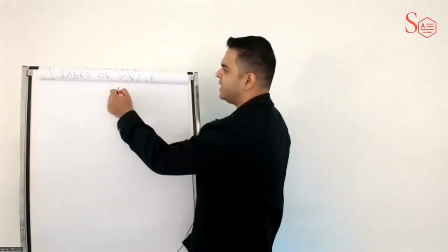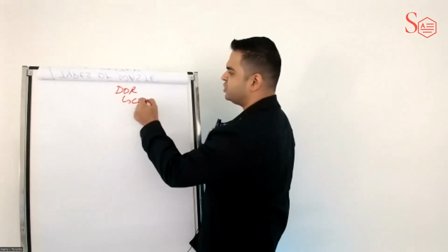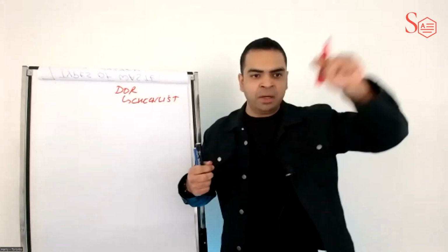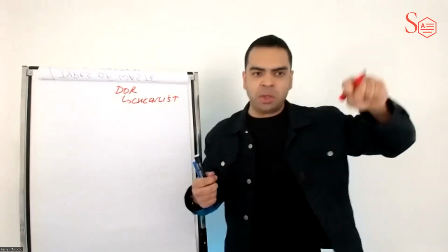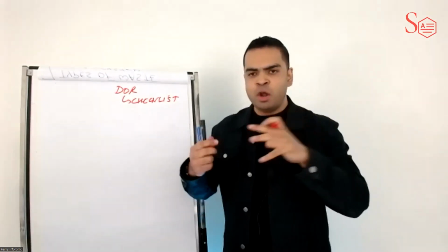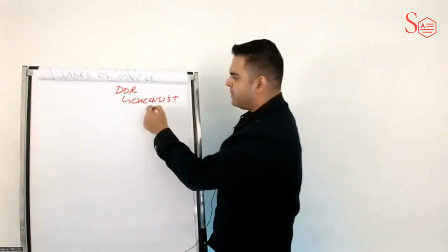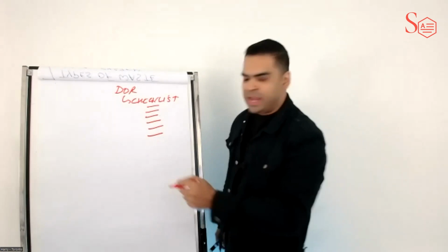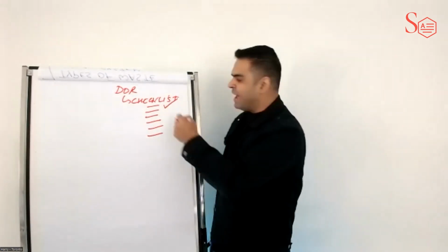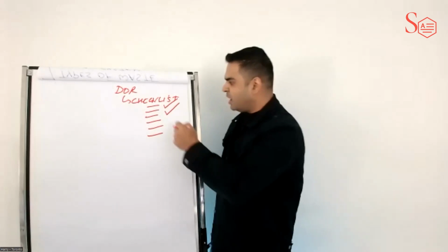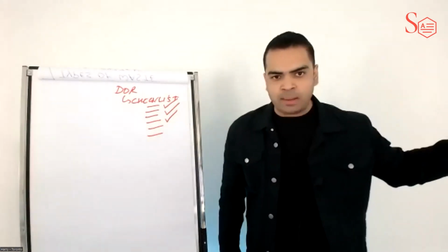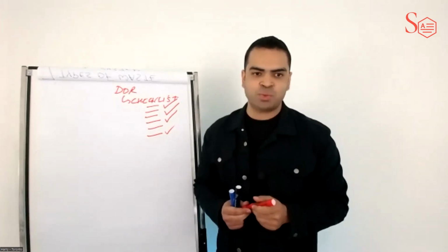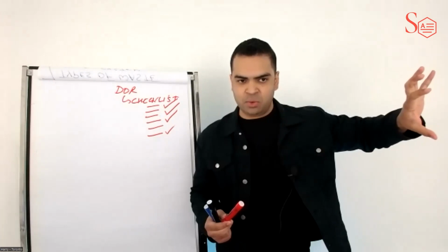Sorry. Spot on, right? So definition of ready is essentially a checklist that we can use to mark something ready to go into backlog or to go into a sprint. For example, for a story to go into a sprint, we want to make sure that these 6 things have been identified. We have a clear acceptance criteria. We have a wireframe identified. We have agreed on what some of our key outcomes are going to be. And then we put it into our sprint backlog, and that's when we take it into execution. You with me?